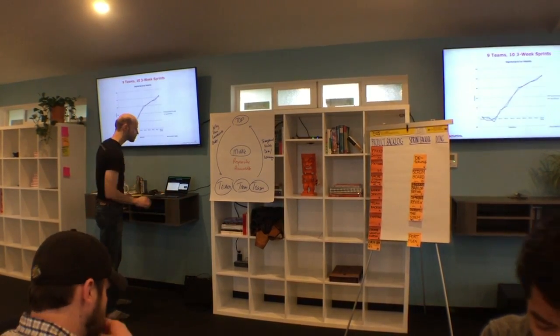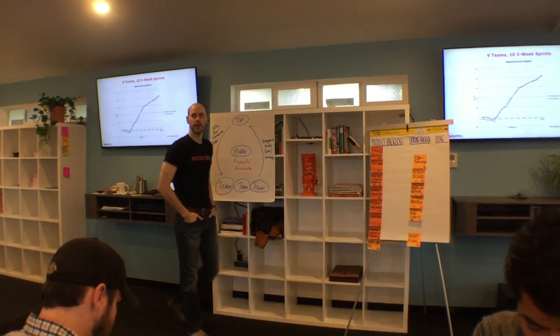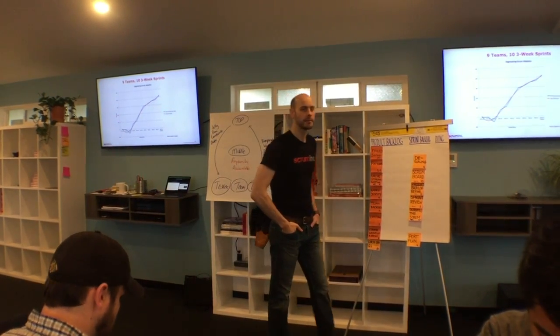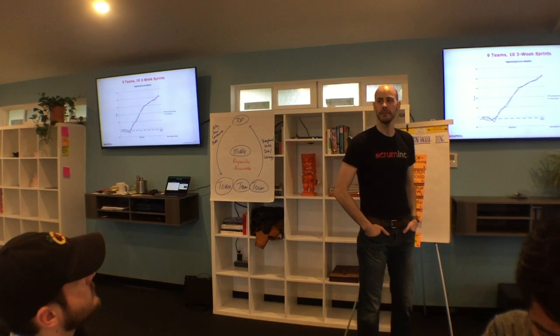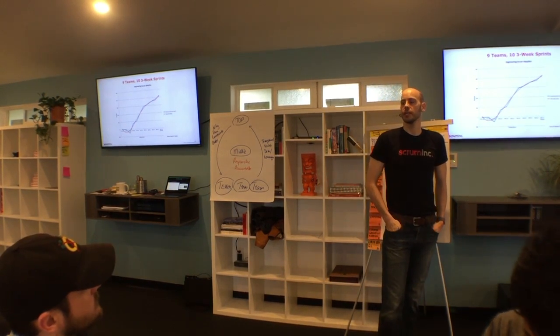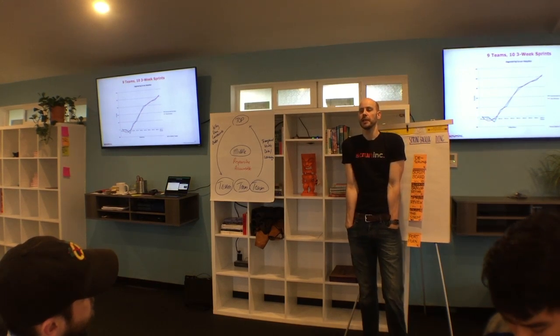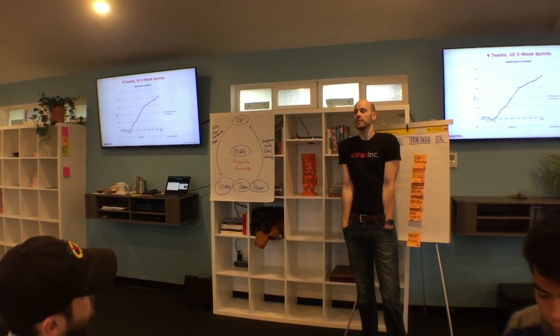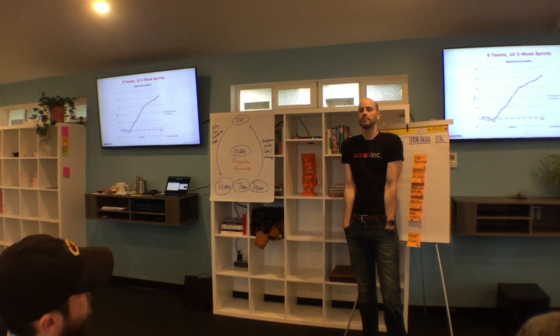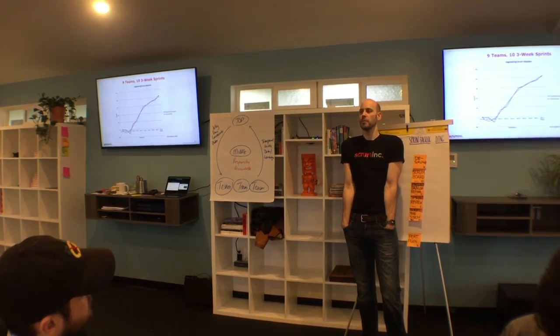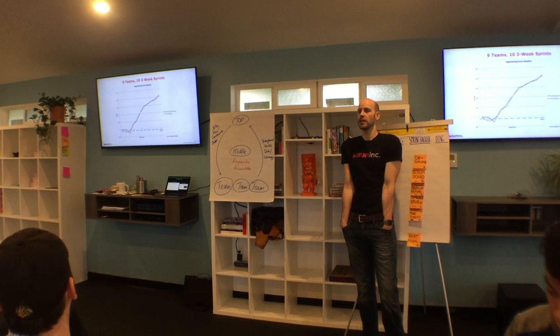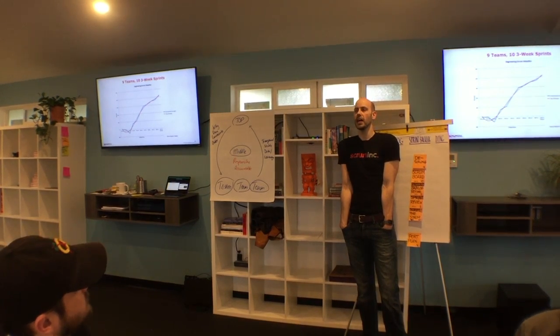Okay. Now the SimpliVity team did something that was really savvy in my opinion. They had one hyper-productive team. So they put them in a great big open work area with no walls. A room a lot like this, but a little bigger. The Mach Speed team, as they were called, was the center team working at a table almost exactly like this, hardware and software. And they put 9 other teams around them.